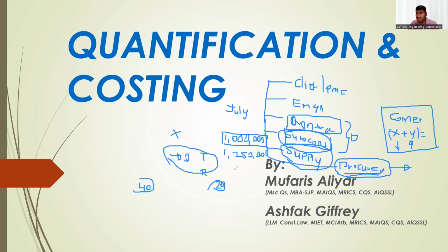So he will tell the subcontractors, according to your contract, you cannot claim more than 1 million, for example, in the interim payment. Because sometimes the appendix to tender will specify that a subcontractor cannot claim more than 1 million in the interim payment. So the contracts guy who is familiar with the contract can come and comment also. So these are all the QS duties.